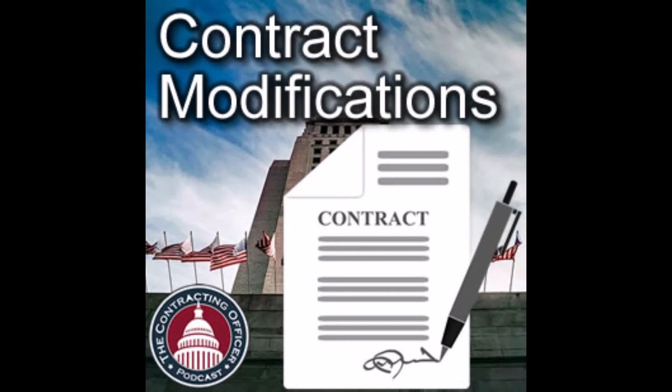There you go. And the more your counterpart understands your process, and you understand theirs for that matter, the more effective these mods can be. From my perspective, there are times I handled it well. I was on a large system, and I had a good understanding of what the process was for my counterpart on the contractor side. So I could really tell this mod is going to take us 2 months, because my process takes this long and his process takes that long, and we can work them both. Yeah, once we think we've negotiated it, then we have to get stuff reviewed. Yep, yeah, I get it.